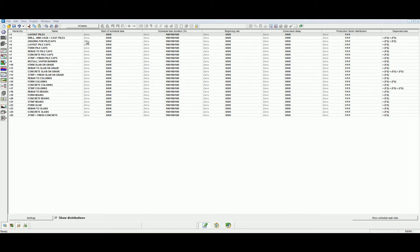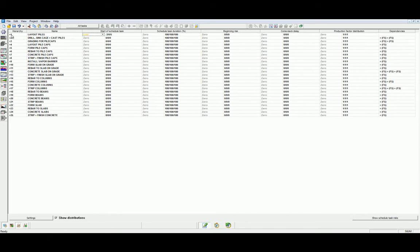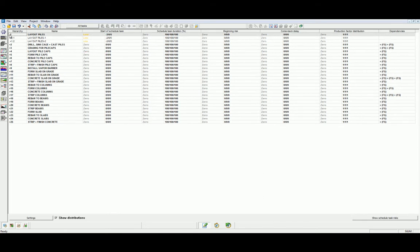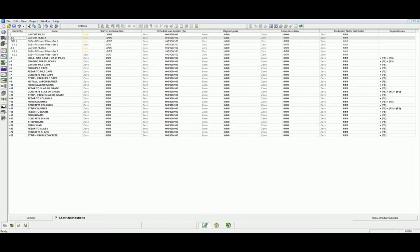We can assign risk to a task as a whole. We can select a low, intermediate, or high level of risk for each of the different risk values. Alternatively, if we feel that different locations will include different levels of risk, we can set these values independently. Let's complete this example by setting the risk levels for each of the tasks within each of the risk categories for our schedule.